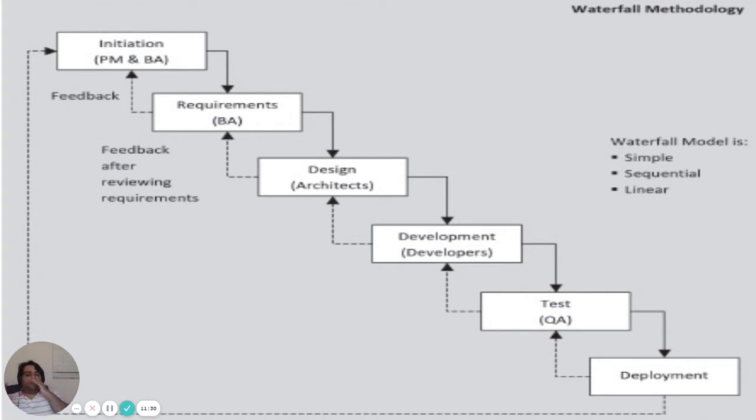So once the phase is complete, all the stakeholders will sign off. Nobody is going to change any requirement once the requirement phase is complete. Once your design phase is complete, that is the design. Nobody is going to change it. So it is a very rigid kind of environment. It is not ideal for huge development because with bigger projects, the market is very dynamic right now. Everything is changing. You never know what comes next tomorrow, right?